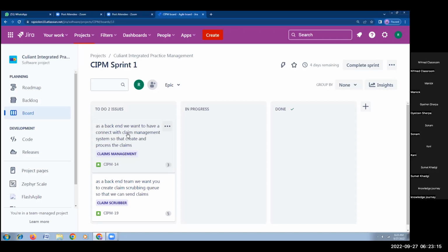Is it clear to everyone? The issues that are taken may not be assured to be completed on time all the time. If that is the case, whatever leftover issues we have will be transferred to the next sprint, and they will be worked on in that sprint itself. So no extensions will be given. Once sprint planning has started, it depends completely on the team's performance. Whether the team can execute and deliver properly or not is the responsibility of the team. Is it clear? Understood?